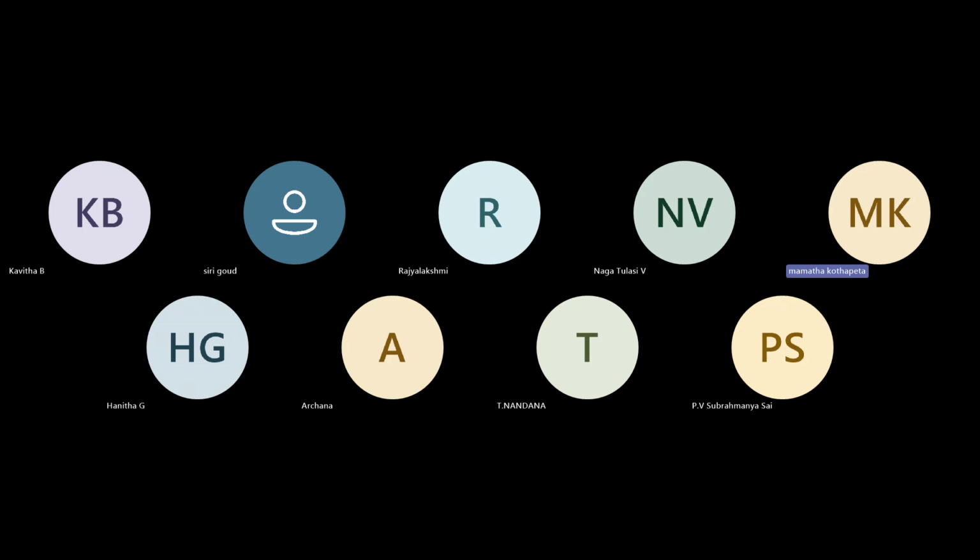This is the inbox page. Okay, this is okay. Inbox page is ready. Inbox page looks and feels good. If he says it is right, then it is completed. If not, most of the time there will be a definition of done written and agreed. In that, it will be mentioned like this: if all the subtasks of the user story are covered. Inside a user story, you have multiple subtasks, right? If all those things are covered, then the definition of done is completed.